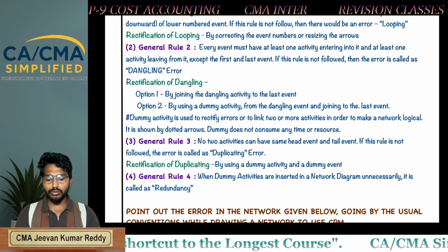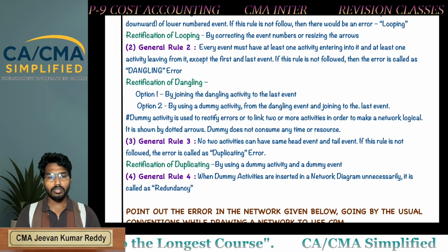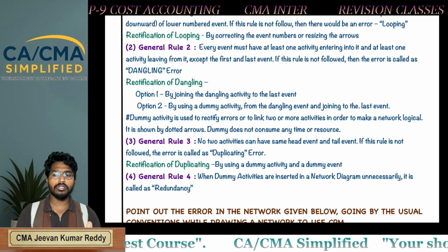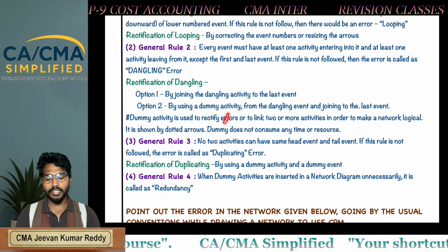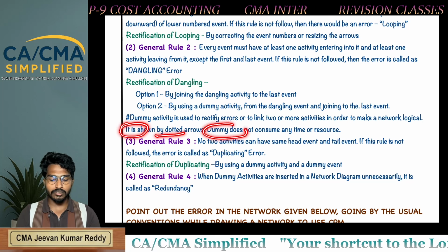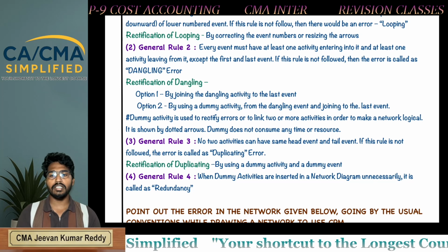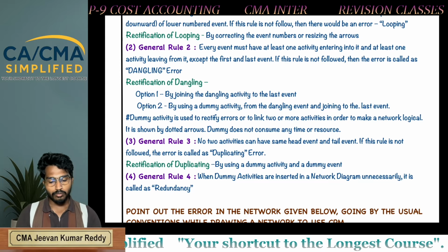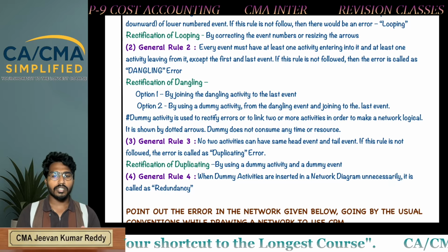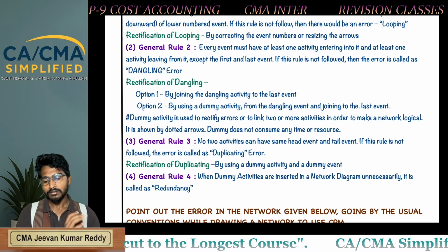Next, dummy activity is used to rectify the errors or link two or more activities in order to make the network diagram logical. To make the network diagram logical, for that purpose only we use dummy activity, or to rectify the errors. It is shown by dotted arrows. Dummy does not consume any time or resource. Don't use the dummy activities unnecessarily.